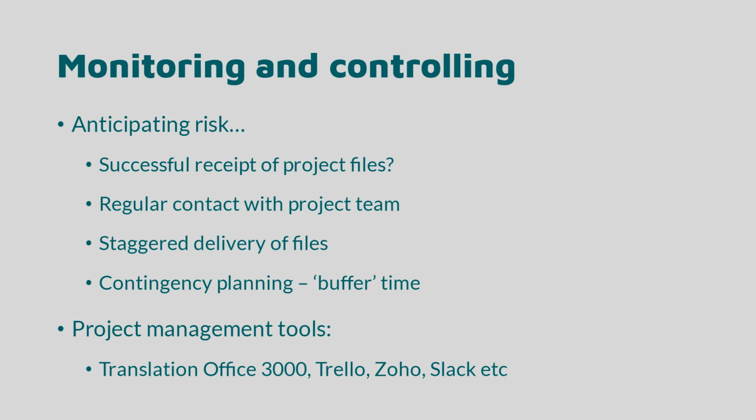For example, have linguists received their files, and could they successfully import these into their CAT tool ready to start translating? Project managers should ask linguists to confirm the successful receipt of files and ask them to prepare their own analysis report for pricing purposes, but also because this can serve as useful reassurance to the project manager that all is well with the files. Obtaining this confirmation is important, as the project manager does not want to get to the end of the translation stage only to find that some files have been overlooked due to technical issues.